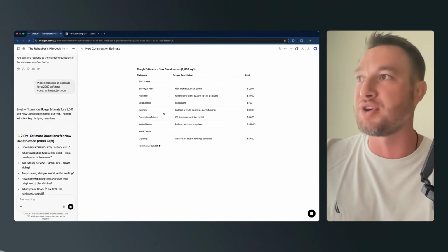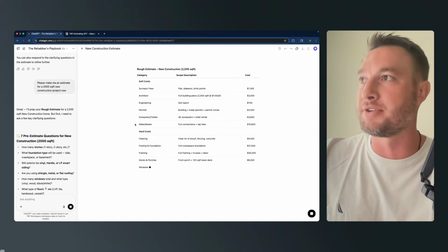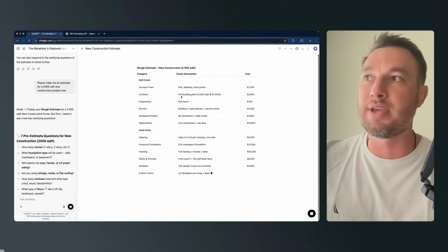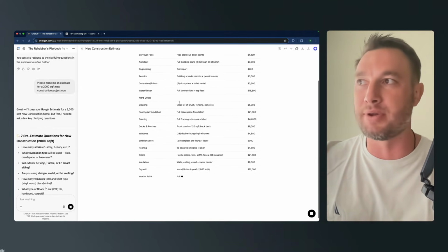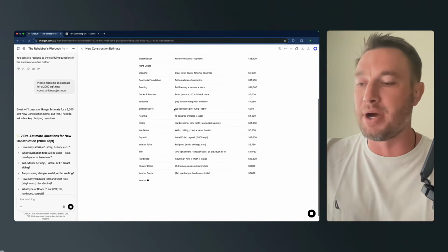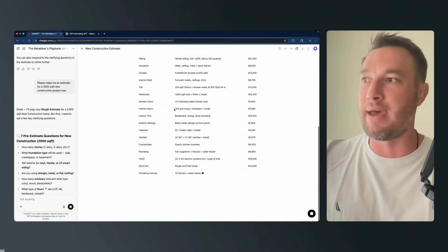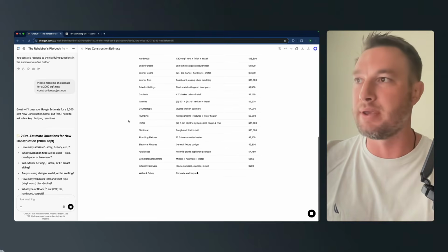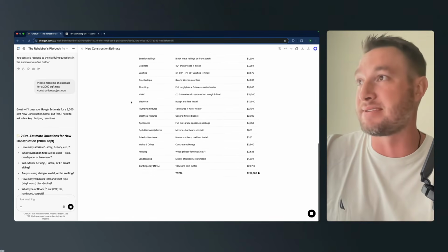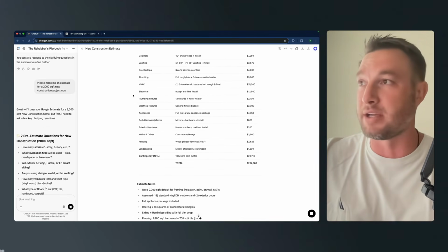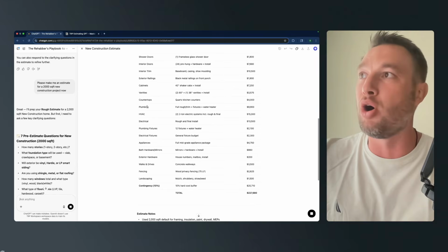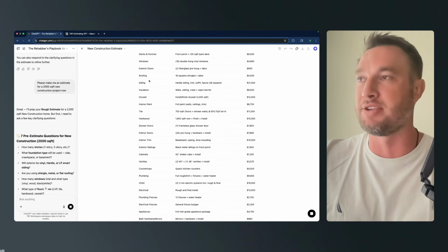And we're going through the soft costs, the hard costs, and it's including everything. This is what's really important: you break budgets because you miss line items. This is making sure you're never missing line items, which is really important. Now, I'll tell you something that's kind of already messing up. I'll just be honest with you. I always want it in a very specific chronological order.